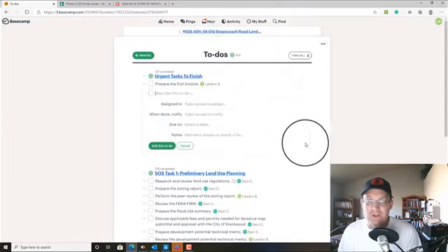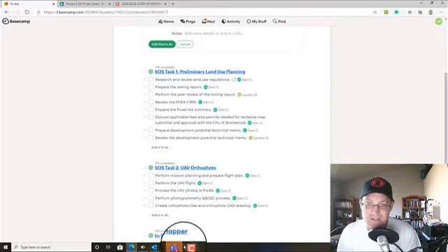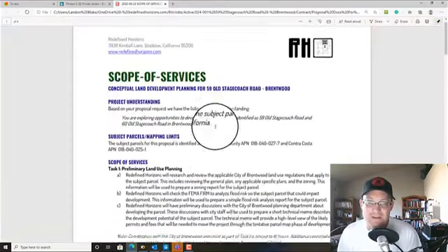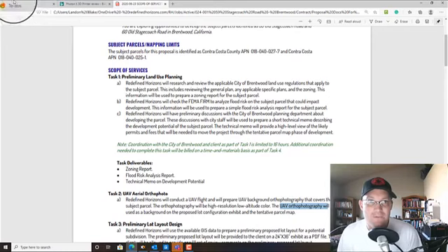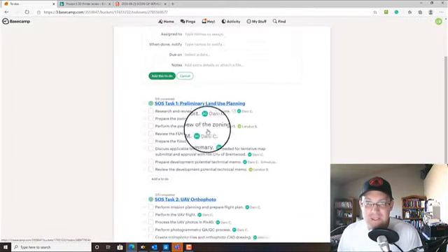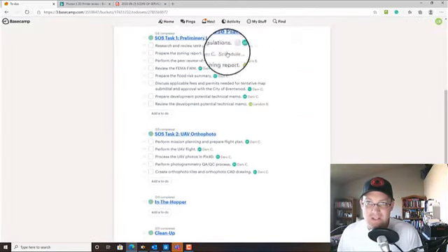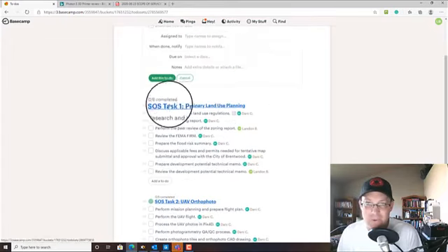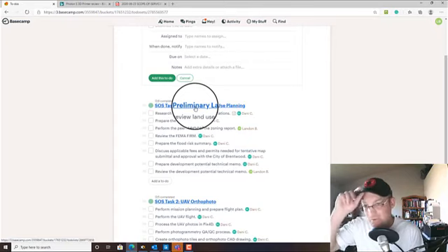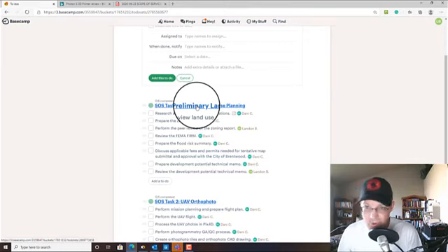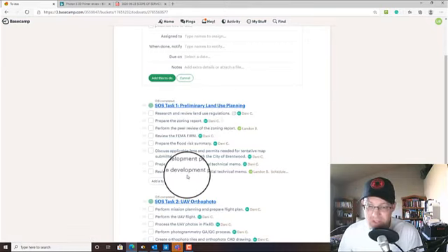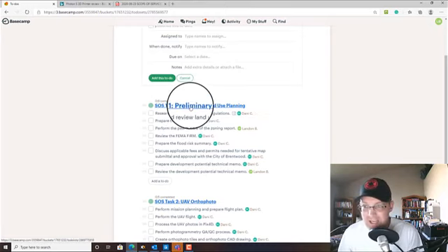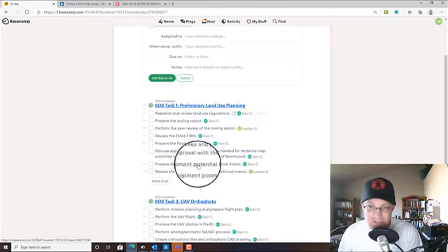Anyways, what I primarily wanted to show you guys in the video was how you can take a scope of services that looks like this, use the information in the scope of services and any workflows that your company has, and then you can actually come in here and spell out the tasks that need to be done to meet that scope of services. And this is really important because your scope of services should govern the work that your team's performing on a project. You want to make sure that you don't do out of scope work without being paid, and you want to make sure that everything that you included in the scope is performed for the client. You don't want to find out the day a deliverable is due that your team forgot to do something.